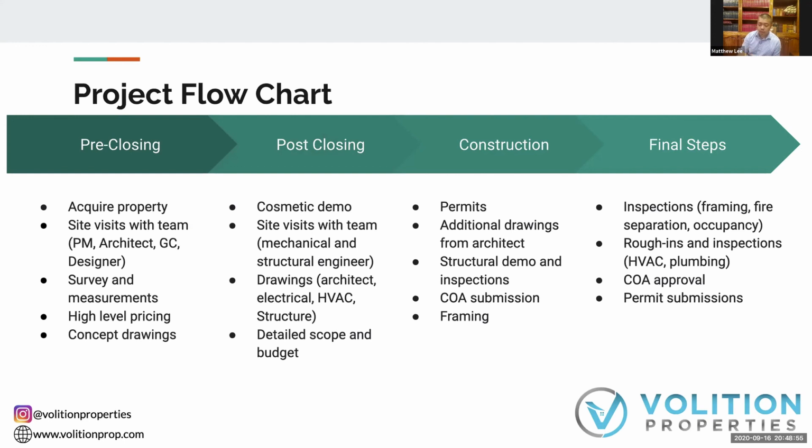Do we put all the mechanicals on the permit set? No, because we're not going for a triplex immediately, right? So our mechanicals are only drawn out for the units that we're going for. The other units are empty, right? They're just rooms. There is empty space though left for mechanicals.